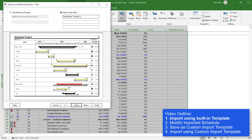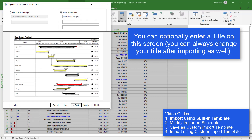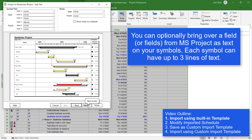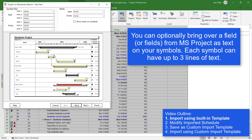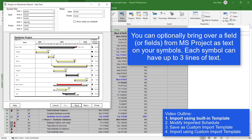You could enter a title here — I've already got a title that I must have typed earlier. You can always edit the title after you import as well. I'm going to press Next. This is where symbol text gets chosen. In this example I've got the finish symbol bringing in the name field to line one — you can have up to three lines of symbol text. A common mistake is having the name field on both the start symbol and the finish symbol, so if you're bringing in a Gantt bar you'll end up with double text, which is annoying, so keep that in mind.